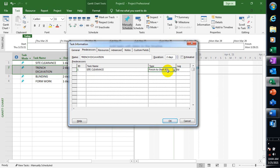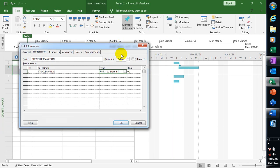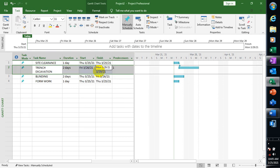Finish to Start means my Site Clearance is going to finish 100% before I come to my Trench Excavation. You can see that my Site Clearance will finish completely before my Trench Excavation begins. Looking at the dates — Thursday the 25th of March is our start date, and Trench Excavation is starting on the 26th of March, so it has shifted by one day.